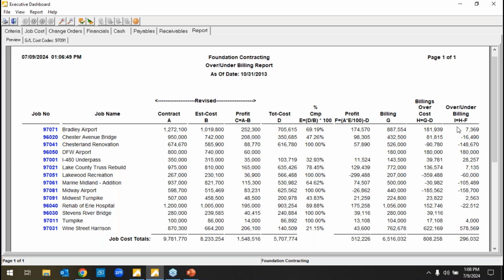Now I'm not a tax professional, CPA, or anything like that, so there's probably different schools of thought on a lot of these things in the construction environment. But theoretically, you don't want to be underbilled all the time for sure, right? You want to be overbilled is what I've always come to see. Now, this gives us a good opportunity as jobs are progressing, right? Bonding companies need these in a lot of cases. CPAs sometimes want to look at them internally though, right? It's a great measurement tool as jobs are progressing for everybody to sit down, right? You need fields input, the project managers, like, here's what we've actually captured in the system, right? Is there a question behind that, right?